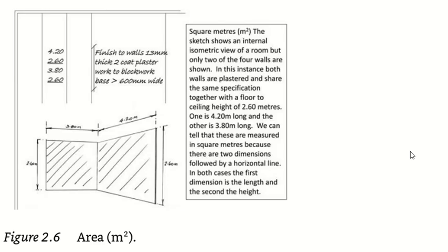And to the block work. So maybe this wall can be made up of concrete, it can be made up of steel, it can be made up of wood. If you go in the standards, you will see different materials for the wall. So you have to mention what type of wall on which we are doing the plaster. Got it? And to block work which has a base of more than 600 millimeters wide. So the width of the block work is more than 600 millimeters.